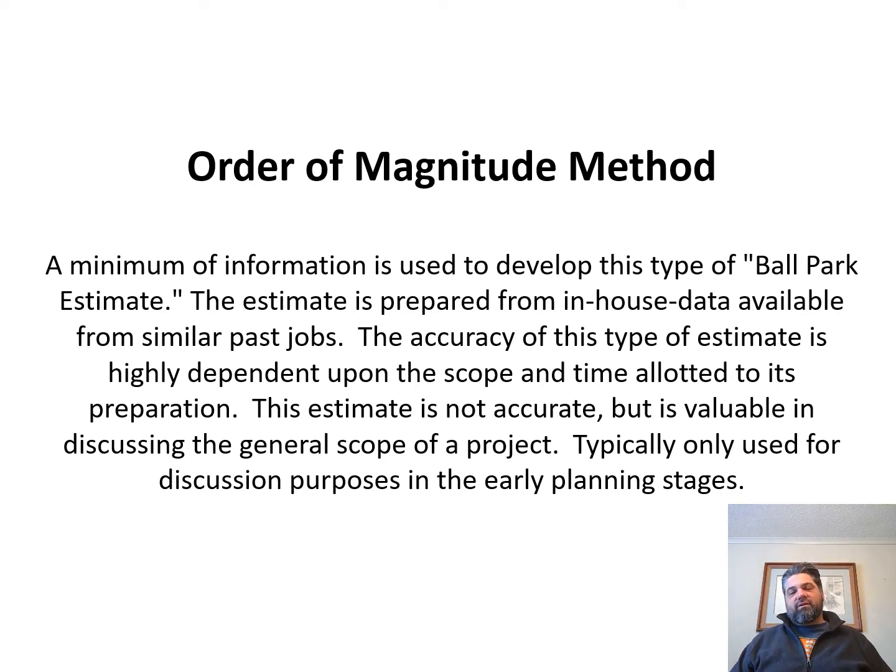As an architect, you're going to be asked all the time, hey, I want to do this building, how much is it going to cost? It really comes down to experience, what you're seeing in the market. A rule of thumb might be, you ought to be able to do that 5,000 square foot building for about 1.2 million, probably.